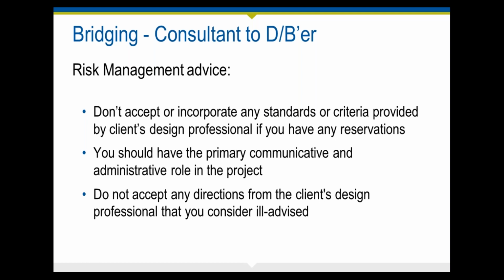If you are on the other side, if you're working for the design builder as a design firm, you have to make sure to maintain your independence and your loyalty to the design builder. So typically what the independent design professional will provide you, the design builder's firm, is performance requirements, standards, design criteria, or other base elements that must be incorporated into the design.